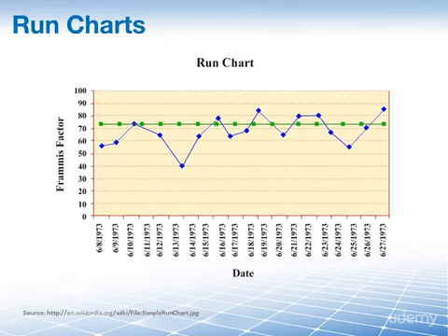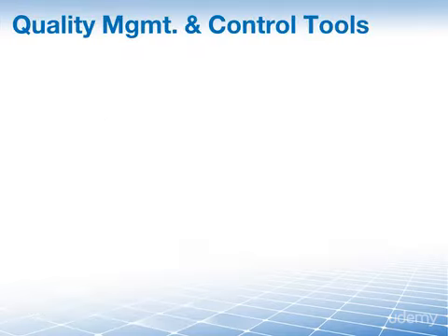Trend analysis is often used to monitor technical performance, like how many errors or defects have been identified and how many remain uncorrected, as well as cost and schedule performance, like how many activities per period were completed with significant variances. The first 7 tools are mostly useful for quantitative problems, those with numbers. So a second set of 7 tools was defined for the more qualitative problems that arise, like those that deal with customer needs. Let's take a look at this second set of 7 on a high level.